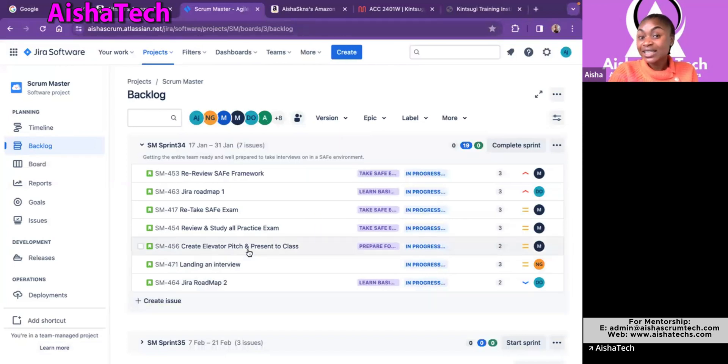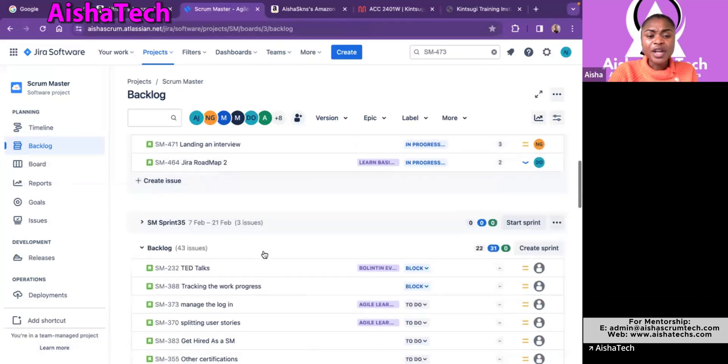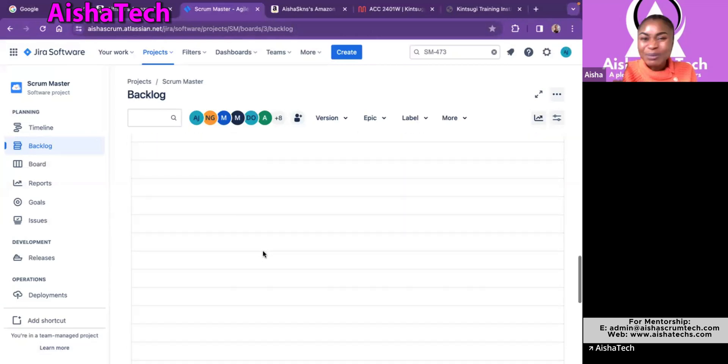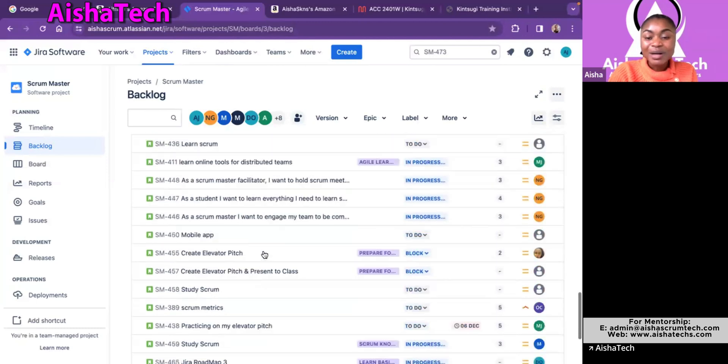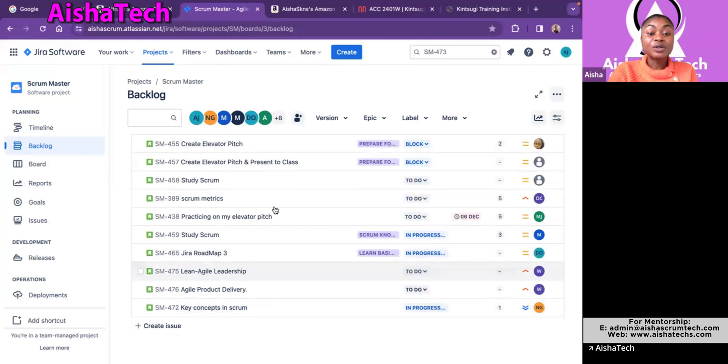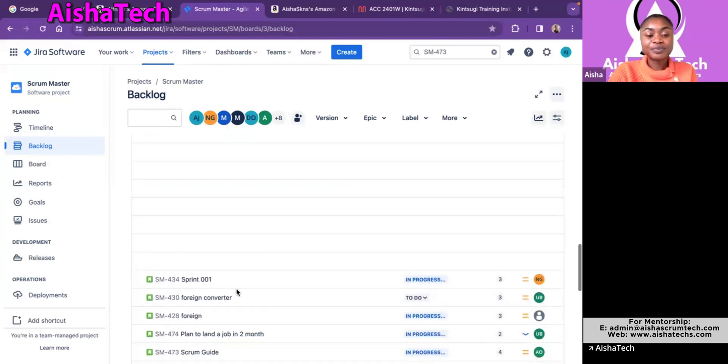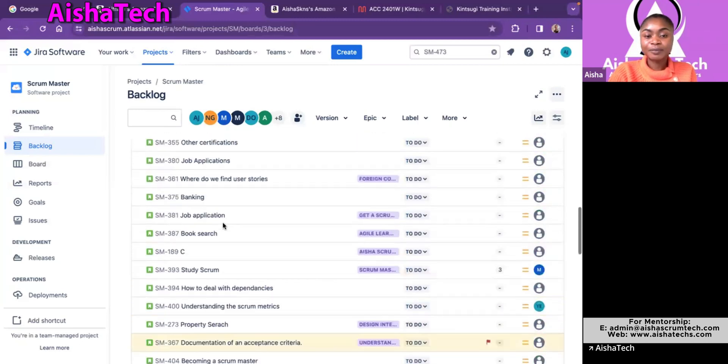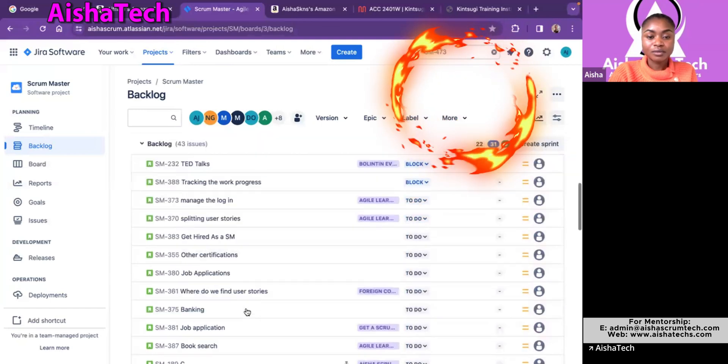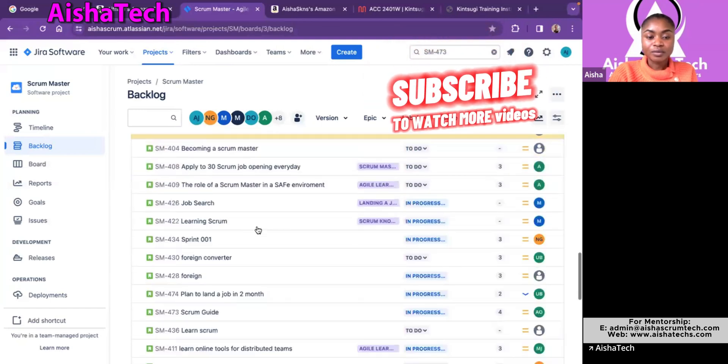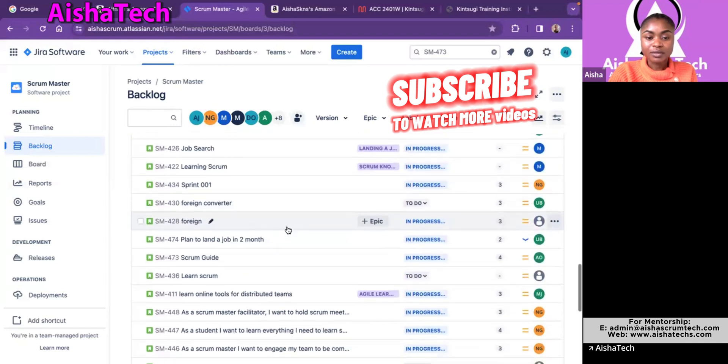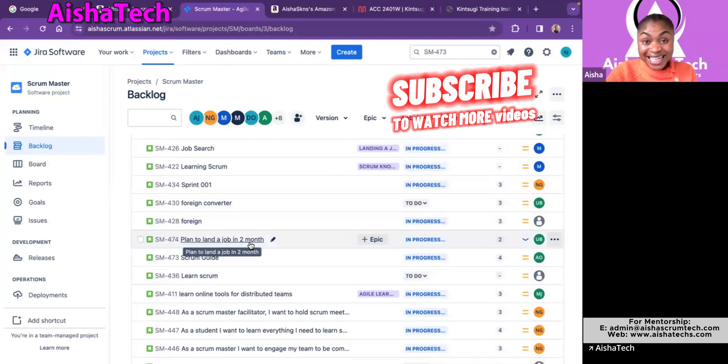It gets out of the sprint backlog and you wonder, where does the story go? To the product backlog. The story will always go back to the product backlog. Whenever you take something out from the sprint backlog, it goes right back to the product backlog. And it's going to be in here somewhere. And right here, the story goes back to the product backlog. And if we did that technique, Jira will not give us warning.